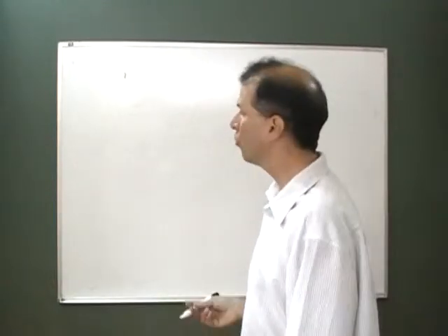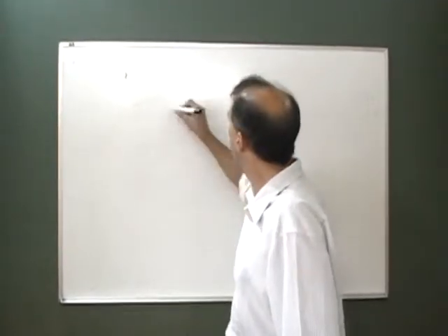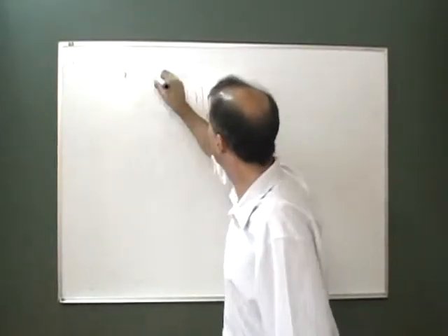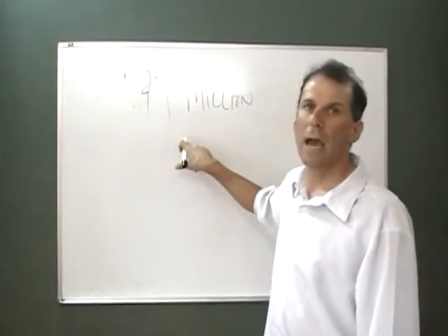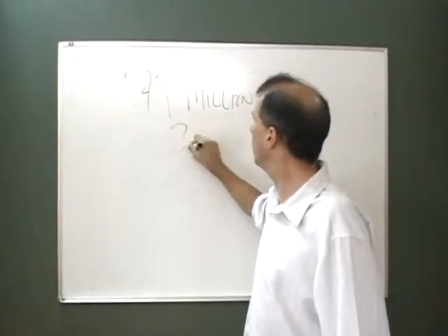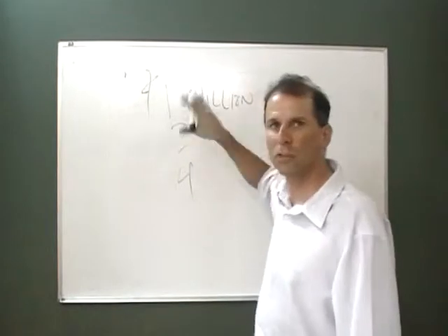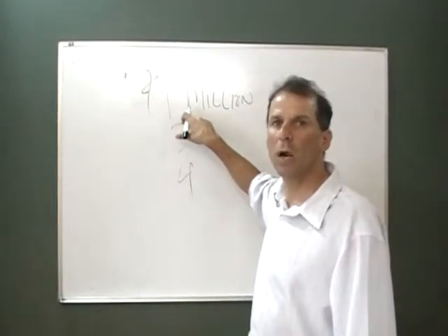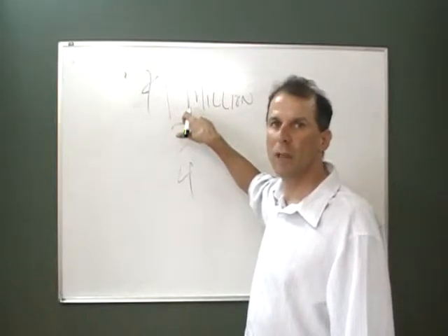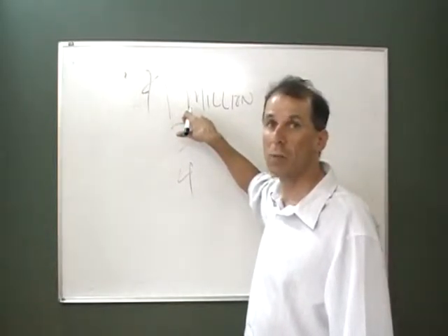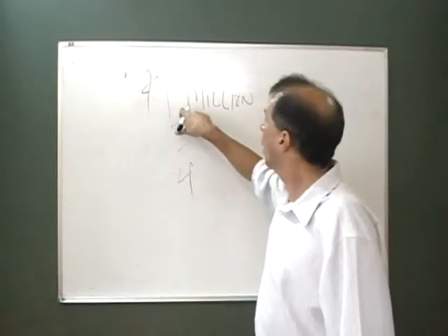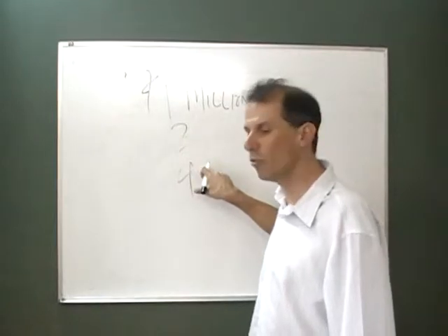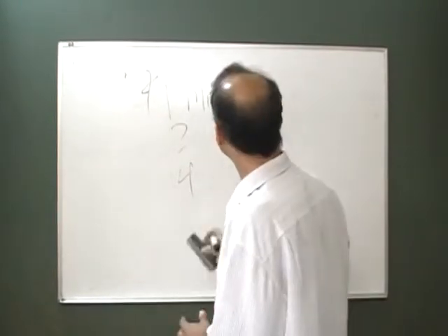Then you can look at, if your sales projections, let's say, for one market are $1 million in the next year. And then the following year, let's say it's $2 million, and then $4 million. We're just making these numbers up. If I'm late, and I produce my software, and I'm 6 months late, which is not an unheard of time, we'll even just pick 3 months. What happens to this number? How does that affect this number? And down the line. So there's a very high cost of sales to being late.